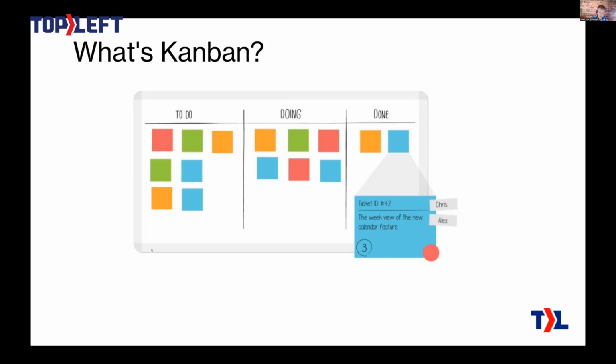A characteristic of Kanban is that we focus on managing the work and not the workers. So, obviously, this board is representing the work. We're visualizing the work. That's different from what a lot of MSPs sometimes do, in that they want to manage their workers carefully. If you've ever been in the dispatch portal in ConnectWise or Autotask, it's a calendar, right? It's basically a grid of your calendar and your people. Because it's all about managing the workers, the work to be done is kind of a secondary thing there. It's not the main thing, because they're focusing on managing the workers, and that's what tends to lead to getting a lot of work in progress for a variety of reasons. So that's a characteristic of Kanban: we don't focus on the workers themselves so much. We're mainly focusing on the work.